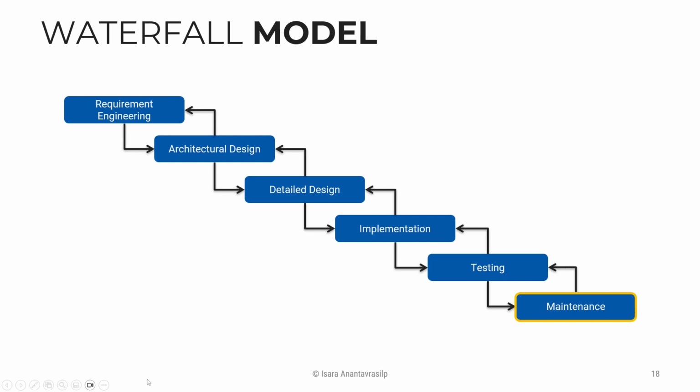The project management is also easy. Project managers like this, because the steps are clear, precise, easy to follow, easy to understand, and easy to convince the customer that, hey, it is done, you should pay us now. But if something is wrong at each phase, we can fix it. If the problem is caused by the previous step, we can move back and fix the previous one. Now, here's the problem. What if the problems are found during the testing phase, but are caused by incorrect requirements? In that case, we might have to start all over again.